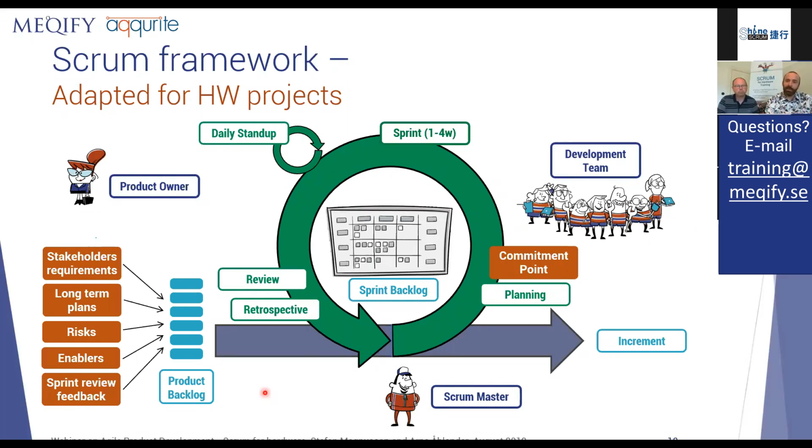So we have added a short meeting. It's more or less just a longer daily scrum. It's 1 or 2 days after the planning, where the team gets time to check all those external dependencies, and come back and say, okay, we have checked, it's feasible to start a sprint. Or we come back and say, okay, sorry, we can't get a legal person this sprint. We need to do a quick replanning. The important thing is that after these 2 days, you don't change anything.